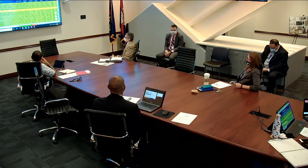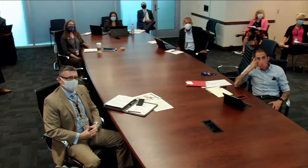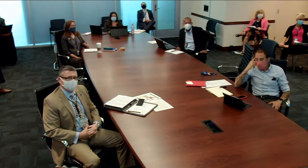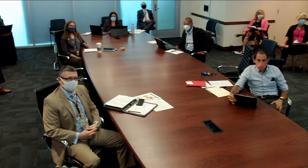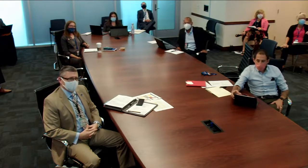For example, line 4, you can see it's a $20 million contract. We've only spent just shy of $3 million, but this month that number will jump up substantially, given some of the pay apps that we have in the queue right now. So I just wanted to draw everyone's attention to that.